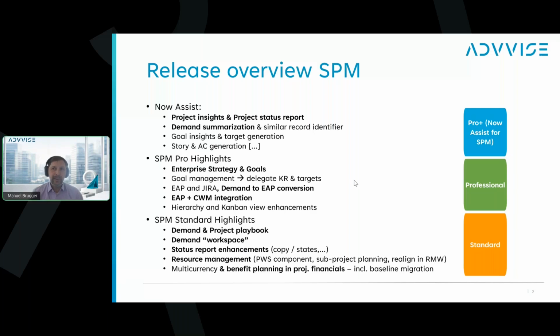There are also some enhancements in regards to resource management. One is an own component in the project workspace, which is now fully navigable and integrated into the project management overview as well. Then we have enhancements when it comes to the possibility to plan resources on sub-projects, and this rolling up into the main project as well, but also the possibility in the resource management workspace to realign resources to the respective timeframes.